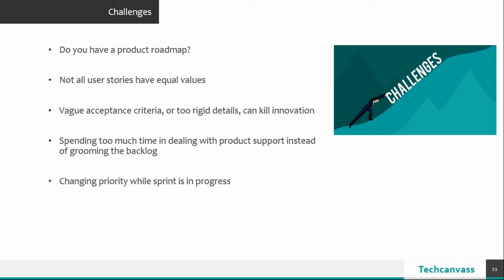And in this process it is also very important, as I said, that my backlog not always consists of user stories or requirements. It also consists of bugs, because the bugs that we get during testing would actually get into the backlog. Bugs which are not showstoppers would remain in the backlog, and probably have to be triaged, and then the priority is decided and worked upon. So you can even pick up bugs in the sprint as well, so that's absolutely fine. So frequent bug triage is very important, which you as a product owner should do on a regular interval.